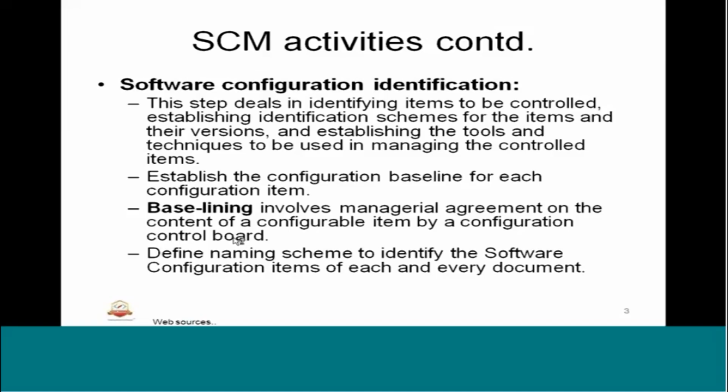Similarly, we can have baselines for the test artifacts also, like test cases. So we have developed the test cases and we come to a conclusion saying that these test cases are enough to go ahead for the next stage of activities. So we say that the test cases are frozen. This frozen is nothing but the baselining. Define naming scheme to identify the software configuration items of each and every document. That means naming scheme and identification of that configuration item is also an important aspect. So that also will be done in the SCM activities.